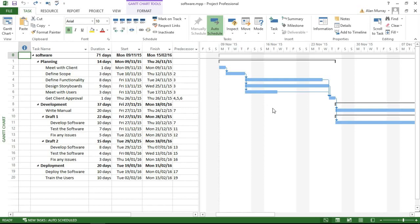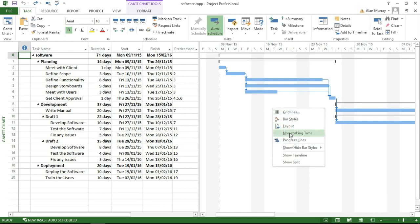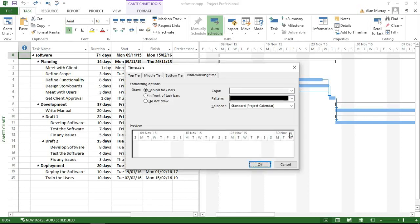We can right-click anywhere in the background of the chart area, choose Non-Working Time, and then choose the setting to display in front of the bars.